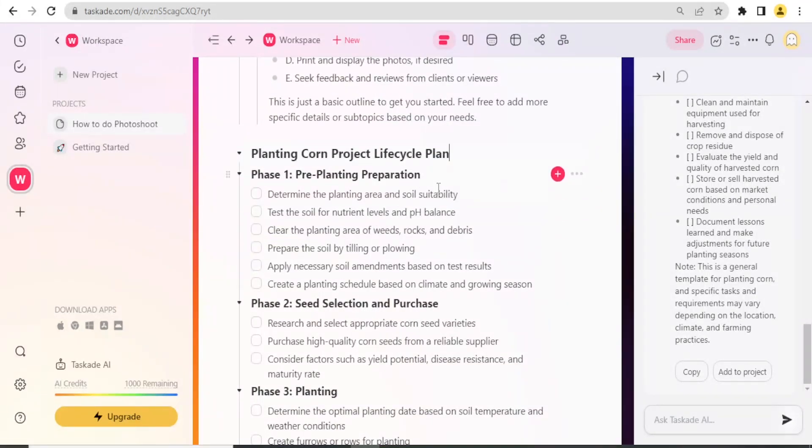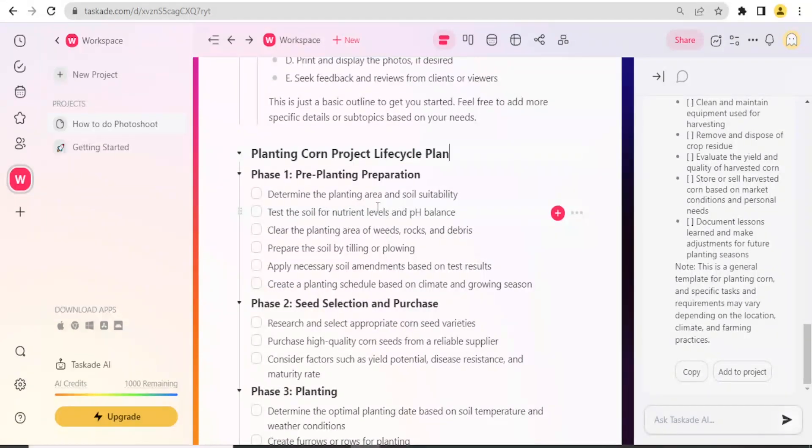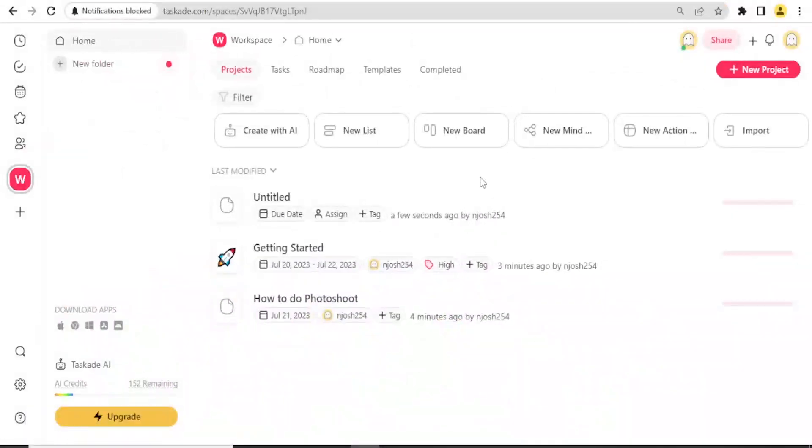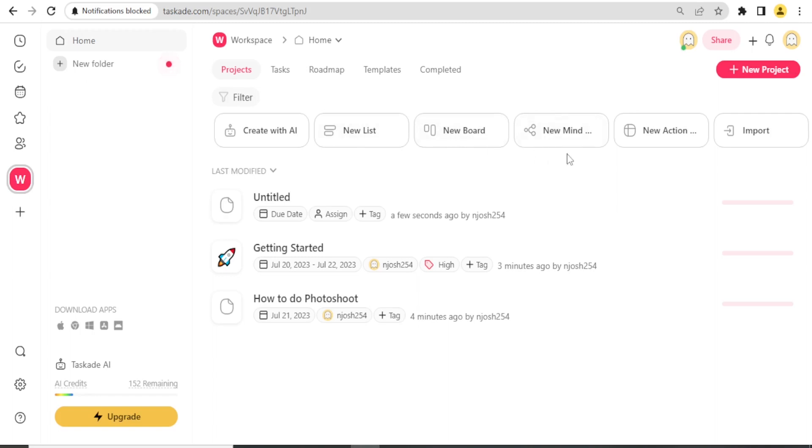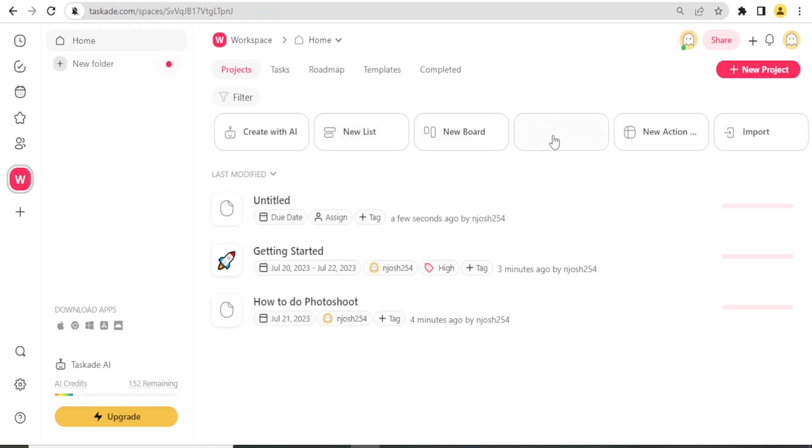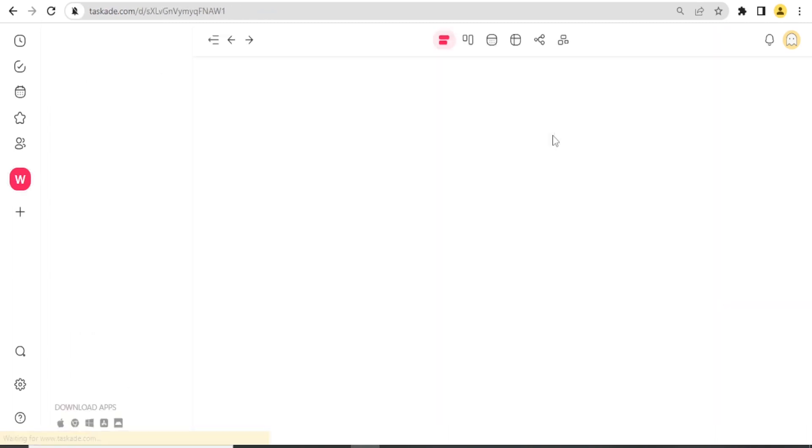Then it has phase one: pre-planting preparation, where you determine the planting area and the soil suitability, and then test the soil for the nutrient levels and pH balance. If I click back Home, you notice we can also have other things. We can view a new list or new board, but another thing that is important for you is the new mind map.